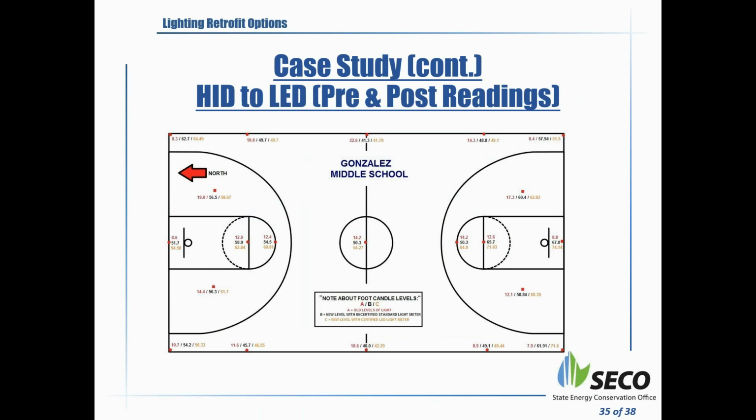One very important thing I just want to quickly go over: when these designs were done, we did pre-installation foot candles, then soon after the installation there were foot candles, and UISD required the contractor to have a certified lighting report with the foot candles.